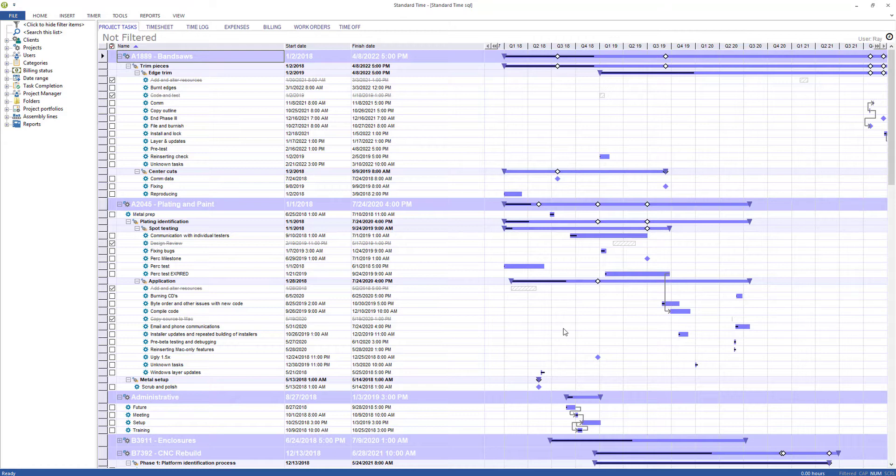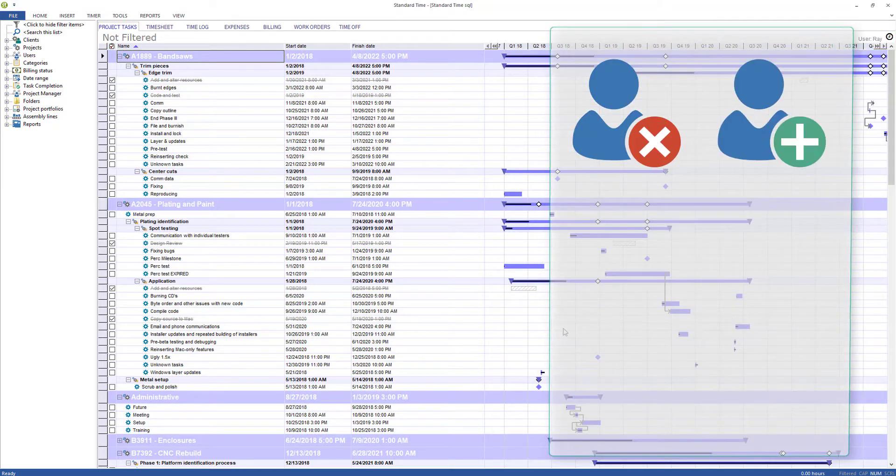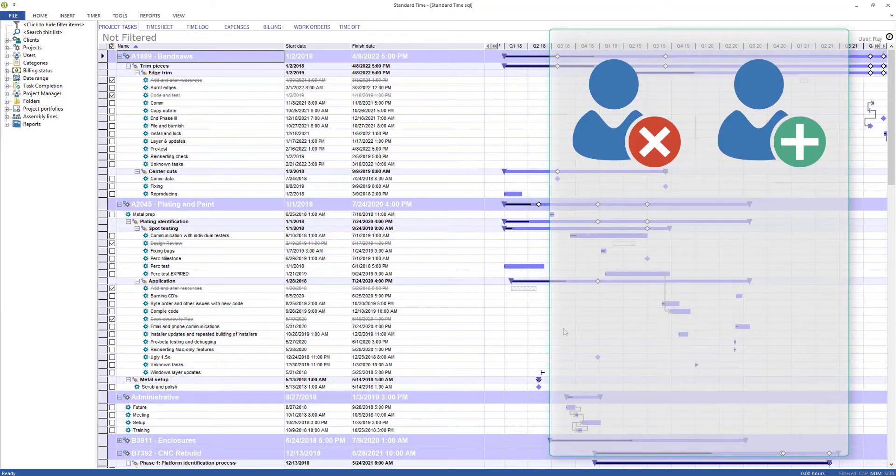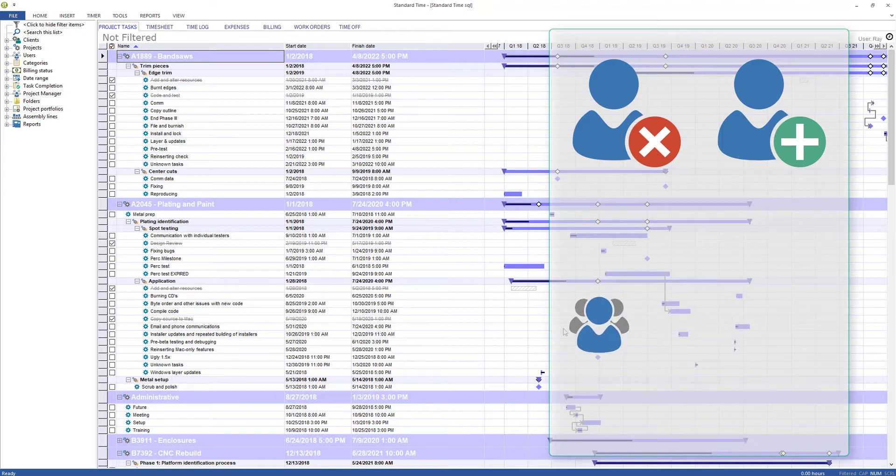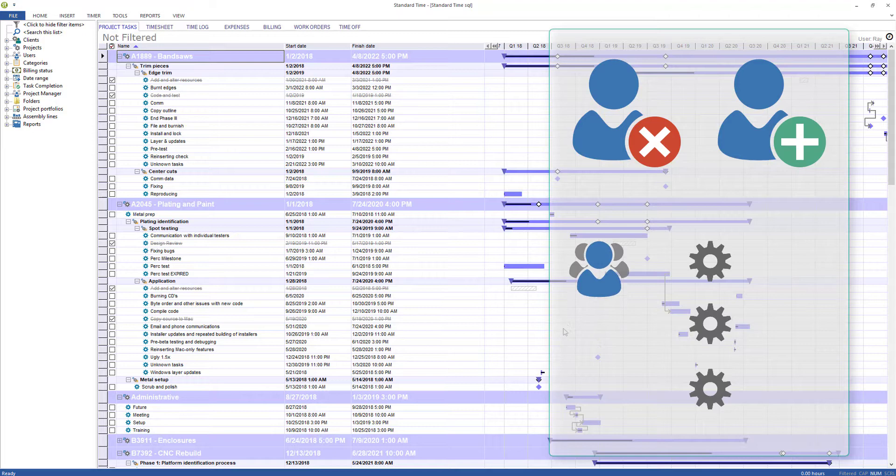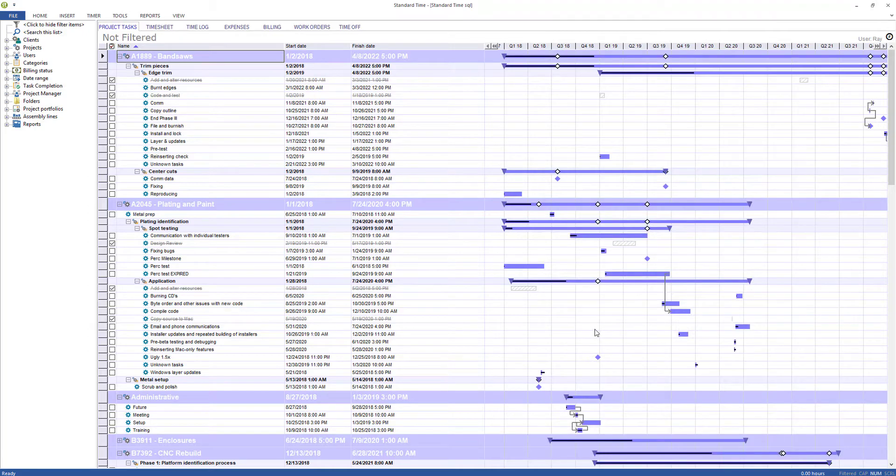And if you find over or under allocated situations or situations where you need more manpower than you have available, you can move projects around, assign them to different groups or people, different resources, change their starting and finish dates. And that can allow you to schedule those projects or work orders so that employees have time to do them.